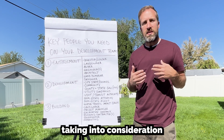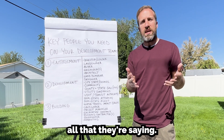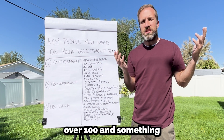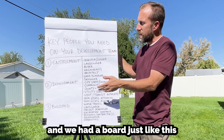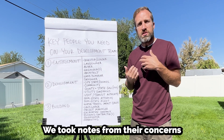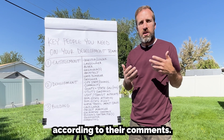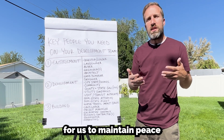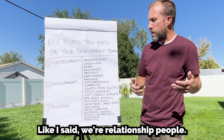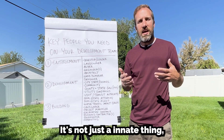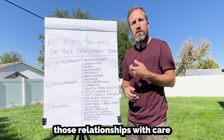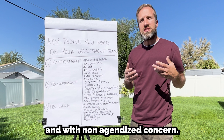Enroll the community as part of your team — take into consideration everything they're saying. We've held huge meetings; we had a big meeting up in Eden, Utah with over a hundred people show up. We had our project blown up on a board, let them see it, took notes from their concerns, and went back and made adjustments. That's how you maintain peace and a good relationship with the community. I believe the project is a relationship thing — it's not just a dollar thing; it's all about relationships handled with care.